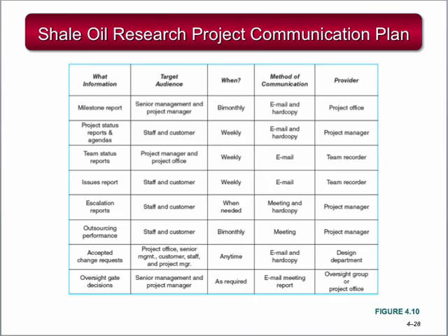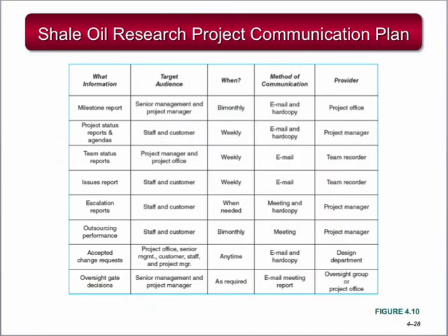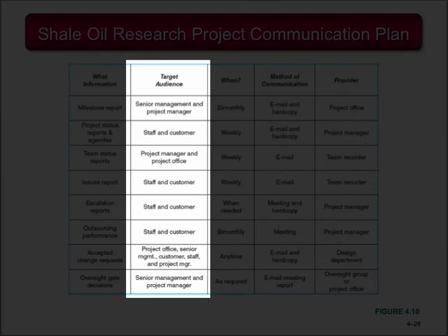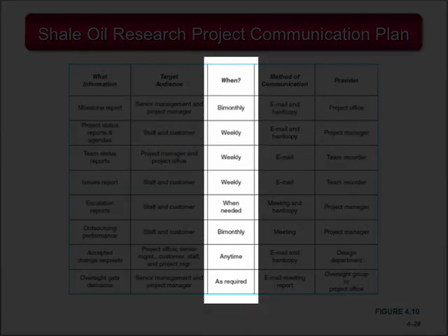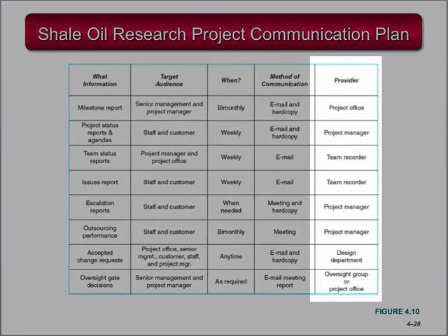Here's a completed project communication plan. You can see it answers the what type of information, who the information is intended for, when or how often, the method the information will be communicated, and who will be providing the information.